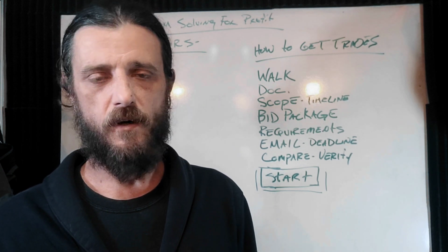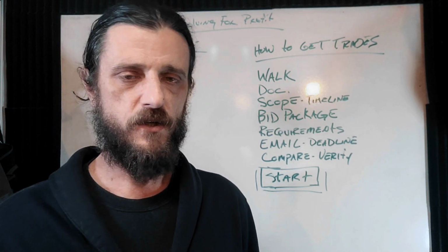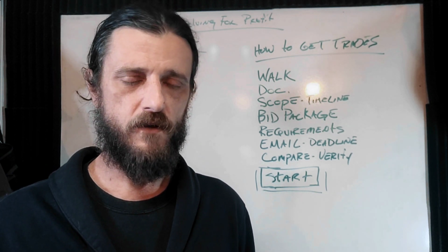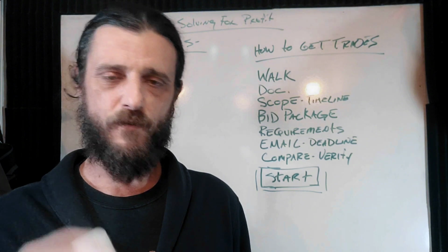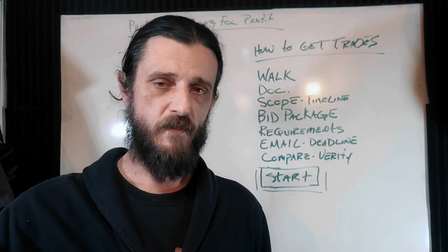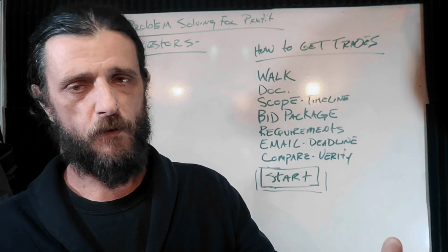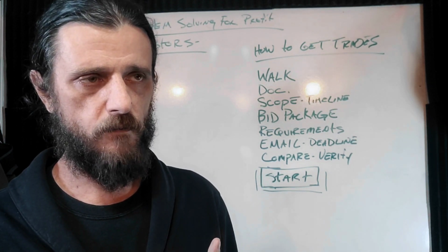So I'm going to tell the plumber I'm going to have 6 fixtures in a second floor bath. Here's how far the run is. Here's how far the drain is. There's a straight shot for the vent pipes. You're not going to have to box that in or anything. So I'm going to know all that information, being that I can fulfill that.